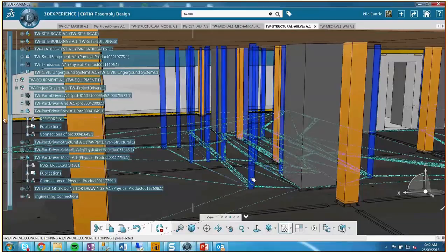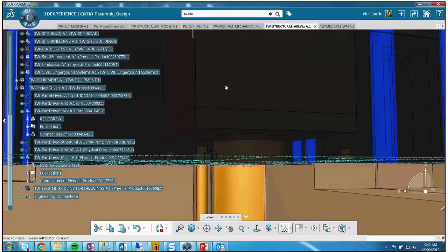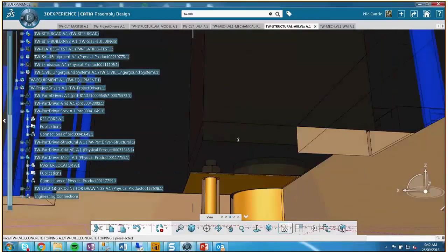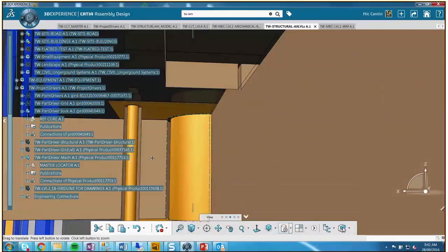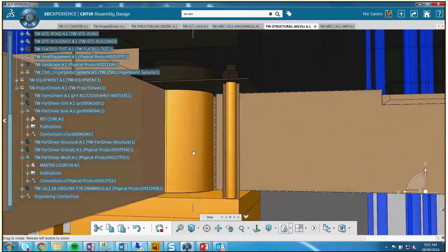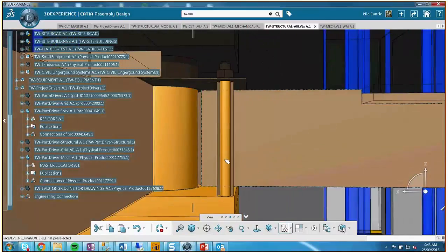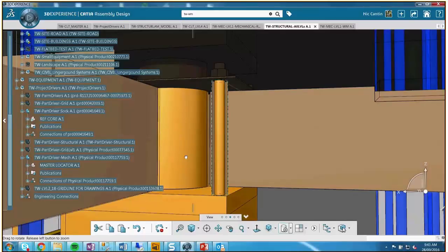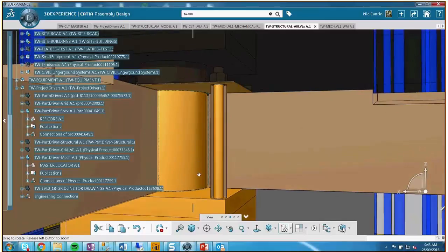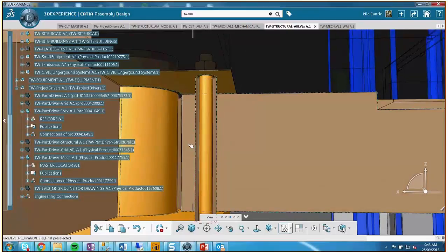And in our model, we oversize, for example, all of our holes, obviously. So there is a level of tolerance in there, but again, it's up to the manufacturer to verify the geometry to make sure that everything's going to fit together. The project has plus or minus 2 mil of tolerance, and they had to verify that everything was inside this.